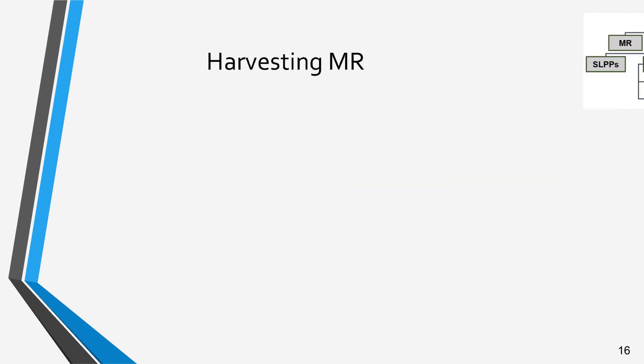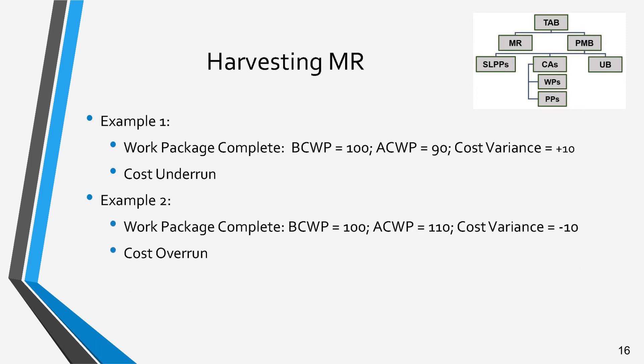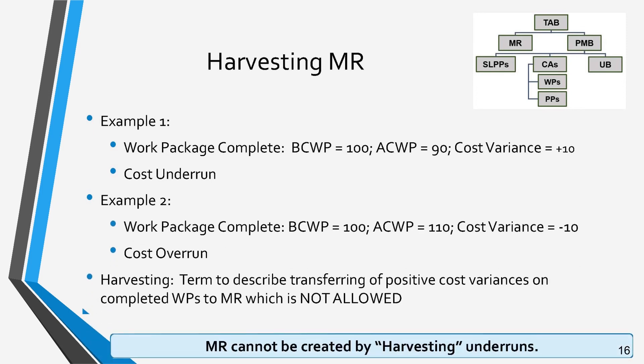We discussed earlier that MR cannot be used to offset accumulated variances — overruns or underruns. In the first example, we see a completed work package with a cost variance of plus 10, which is a positive variance, meaning that the work package had a cost underrun. Should a work package complete with a negative cost variance, like the second example, then it is reported as a cost overrun. EVMS does not allow transferring positive variances from completed work packages to MR for any use. That is referred to as harvesting. Cost metrics are reported as-is.